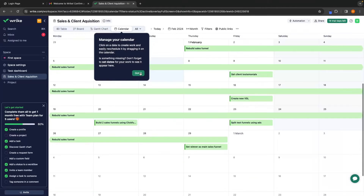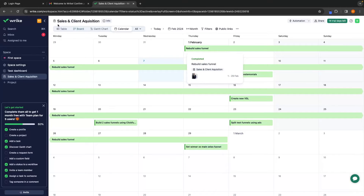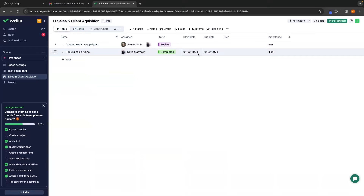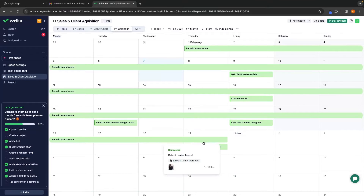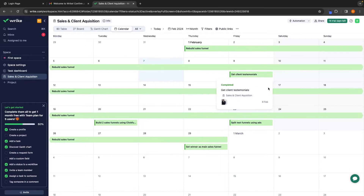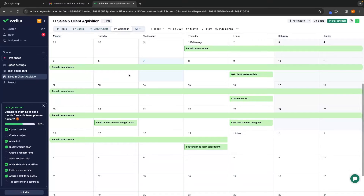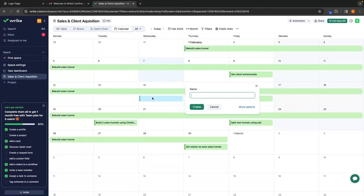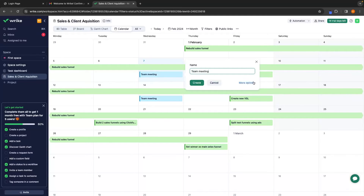Let's click into Calendar — this is going to show us an entire calendar of how everything is set out. We set Rebuild Sales Funnel for the entire month of February, from the 1st to the 29th, and we can see this in the calendar. We then have on the 9th, for example, Get Client Testimonials — all of this is built in from the data we inputted into the table. We can also go to the calendar and add individual tasks, like clicking on the 14th and creating a 'Team Meeting' task for every Wednesday.